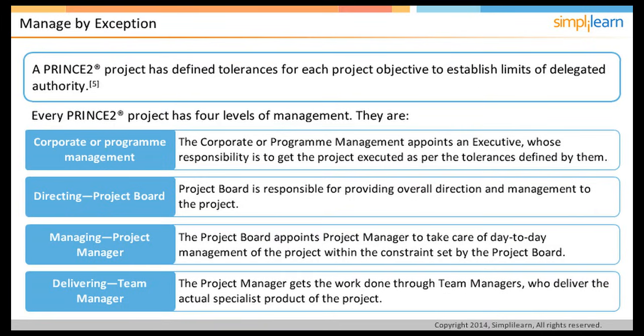There is a defined accountability at each level. The next management level is involved only if tolerances are forecast to be exceeded. Implementation of management by exception provides for very efficient use of senior management time. We will continue our discussion of this principle in the next screen.